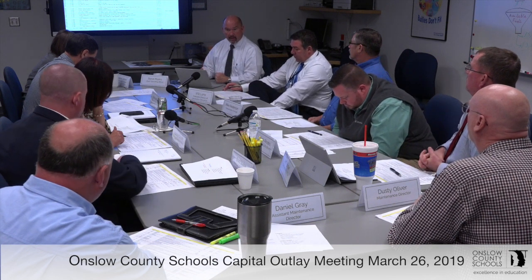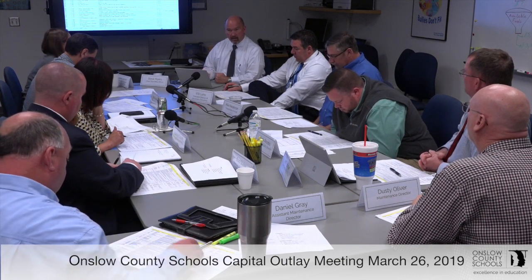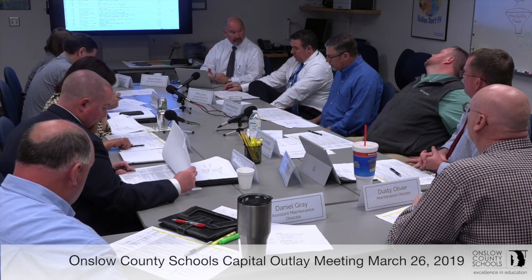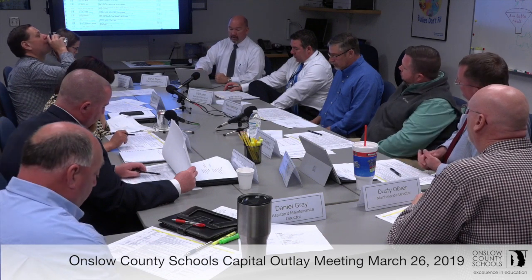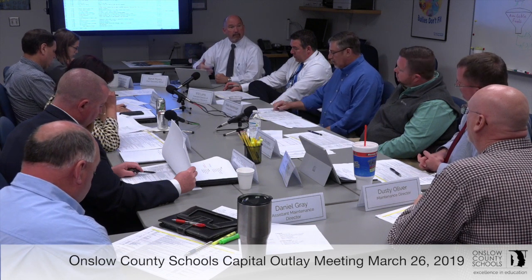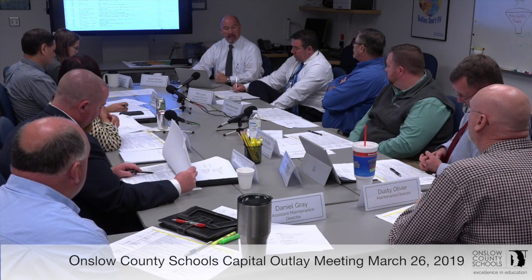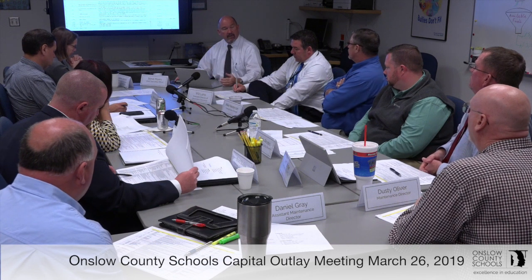So in that process, we do have some contingency money built into the plan. That way, if something breaks, we can go fix it right away. We don't have to go ask for additional money. Now, if in this process all that money gets used up and we go back and look at the capital outlay program, and there are things in there that we had to cut that we didn't need the money after all, we'd go ahead and repurpose it for those items that we had to cut earlier. So there is some contingency funding in there.